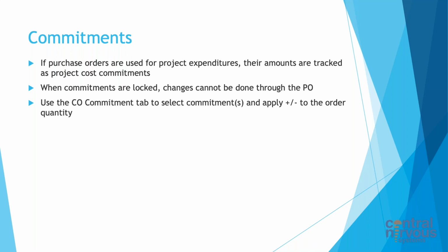Now, in the same manner that we lock our budgets, we also lock our commitments. What that allows us to do is, if we need to make a change to a purchase order, it needs to be unlocked. So we're not just randomly giving a subcontractor more work. We ensure that it is locked and goes through a process to allow it to be changed.